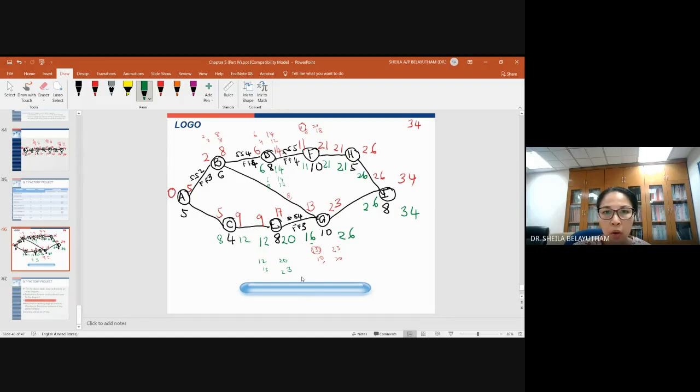So you need to evaluate all of it and choose the smallest one. Okay, so we start from the top one. Okay, from here easiest. Okay, so G starts 16. Then here contributing number will be 16 as the finish. So from here start. Okay, so 6 minus 4, you will start 2. Plus 6, you complete 8. Another one is finish to finish 4. Okay, so 14 minus 4, you will finish 10. Minus 6, you will start 4. Okay, so the smaller one will be 2 and 8.